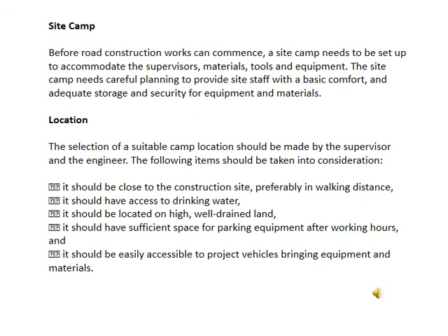Then we are talking about the camps. Before the road construction works can commence, the camps need to be set up to accommodate the supervisor, materials, tools, and equipment. This is the setting up of the site camps. The camps need to be carefully planned. The aim is to provide the site staff with basic comfort and adequate storage and security for the equipment and the materials. Those are the requirements for the camps.